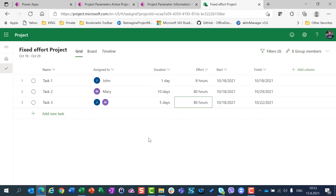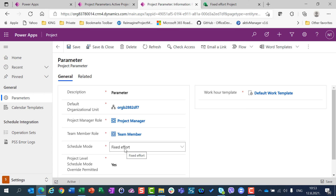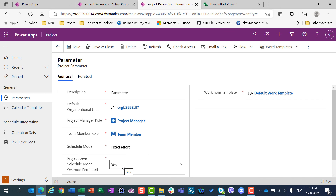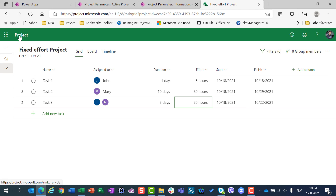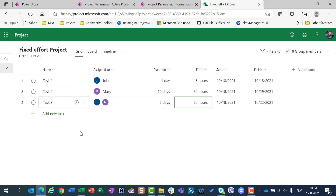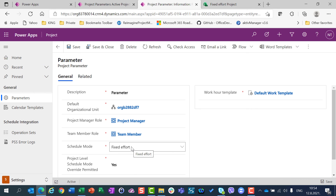To conclude: first, in the project parameter settings you can choose your preferred schedule mode and whether you can override it at the project level. Second, you cannot choose the default schedule type when creating a project using Project for the Web — only when creating via PowerApps. Third, and also very important: when you change your preferred schedule mode, it will apply only to newly created projects, not to existing ones. That's all for today. Thank you very much, and see you very soon. Have a nice day.